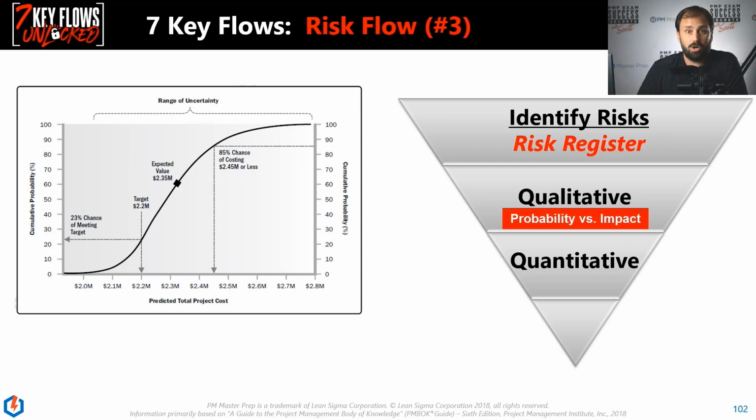Looks like an S-curve for the cost baseline, doesn't it? It's different. What it's saying is this is the overall risk profile. You get this through Monte Carlo analysis. Ooh, fancy words. Monte Carlo analysis. We're just running a lot of occurrences of all the risk. What if all the bad things happened? What would be our total spend? What if nothing happened? What's the chance of that? And then what would be our spend? And then what are all the different occurrences in between, okay?